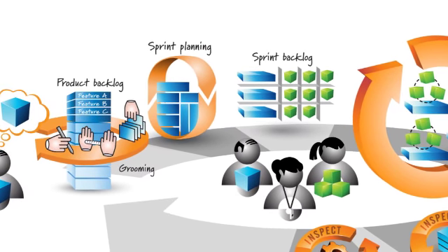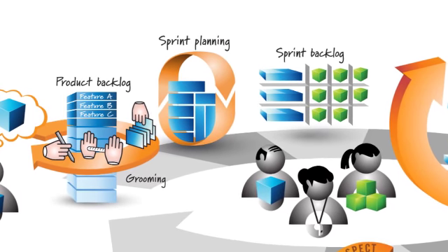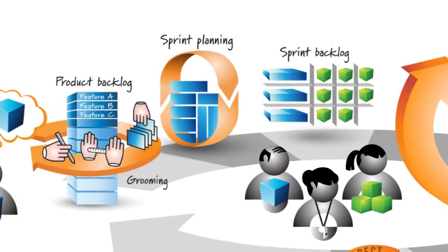Pull work from the product backlog into the sprint that we reasonably can accomplish during the sprint. So you'll notice we've essentially pulled some blue bricks out of the product backlog and into the sprint. And you'll notice also that we tried not to occupy the full capacity. There's a little bit of open space at the top where those 2 arrows connect. That's because things turn out to be a little bit larger than we had expected, and having a little bit of buffer is a good idea.